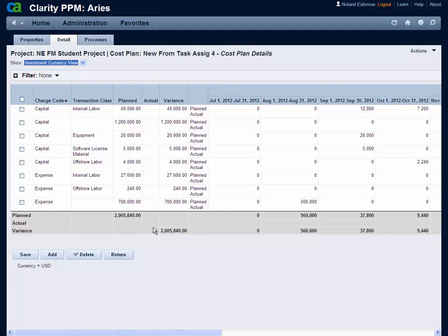So the next step would be to go back to your project schedule, change assignments, change ETCs on the assignments, update the schedule, could be in the logic or when materials will be delivered and paid for, and then make the changes there, and then come back to the cost plan and do the cost plan over and get a new one and see how close that is, as opposed to going in and just changing some of these values. You should try to keep them in step with the project schedule and the cost plan associated with it.